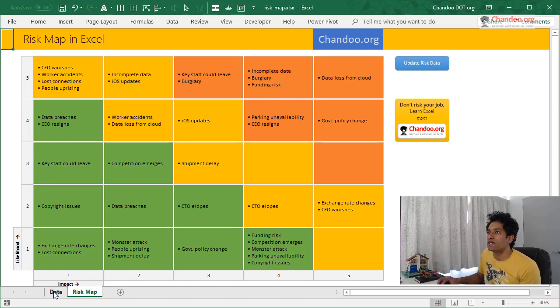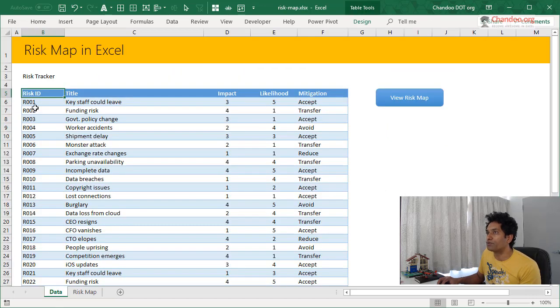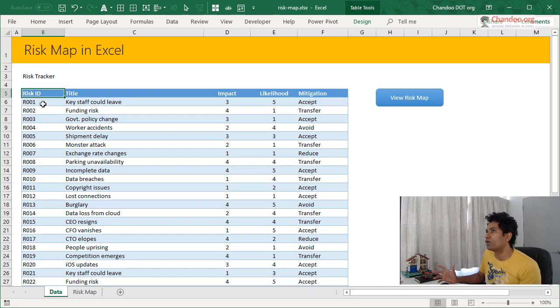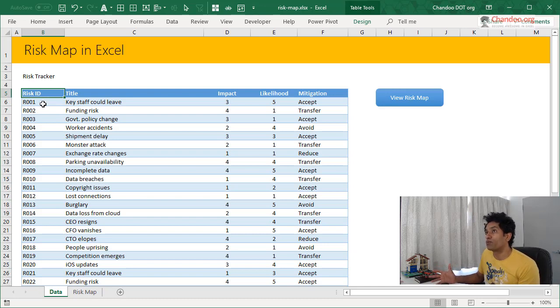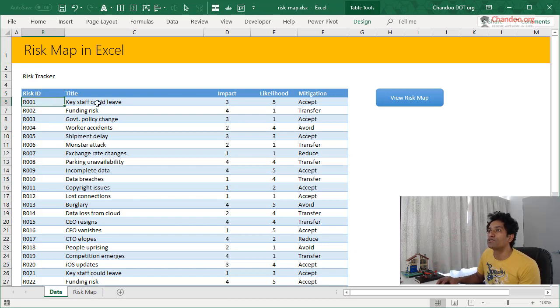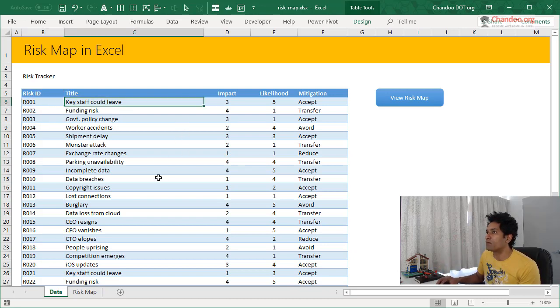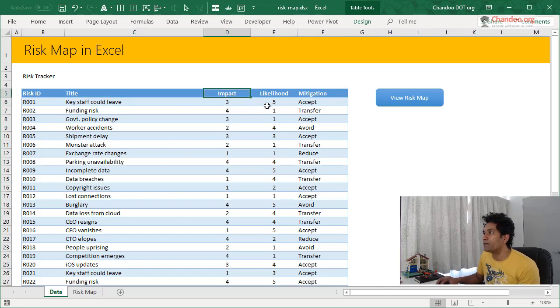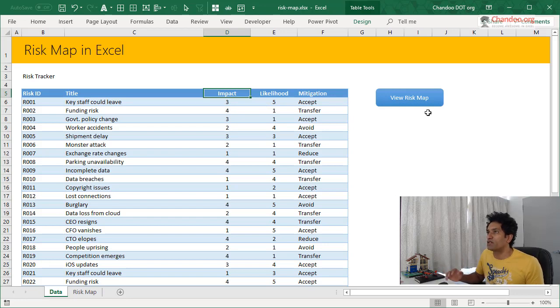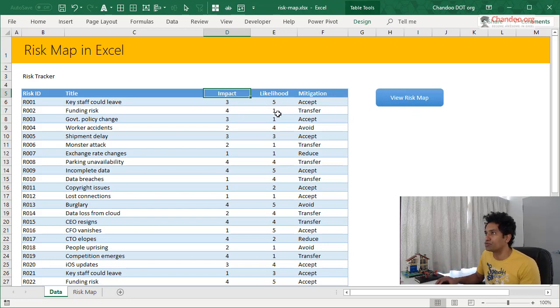So let's take a look at the actual input data. You could have a risk tracker like this. This is fairly common in project management world. So if you are working as a project or portfolio or a program manager, chances are you already have something like this. So you would have a risk ID in some sort of a description or a title about it, an impact and likelihood on a scale of one to five, one being the lowest impact and five being highest impact. So the same goes for likelihood.